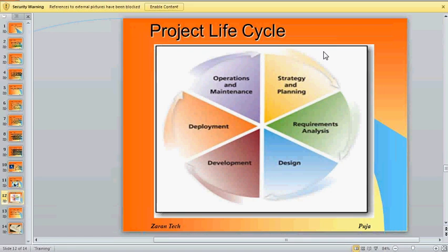Typically what companies do is, even if they have one big master project, they will break it down into two projects. One project, the non-IT component, is going to be managed by a different project manager, a different business analyst, and the IT project will be handled by a different project manager and an IT business analyst.